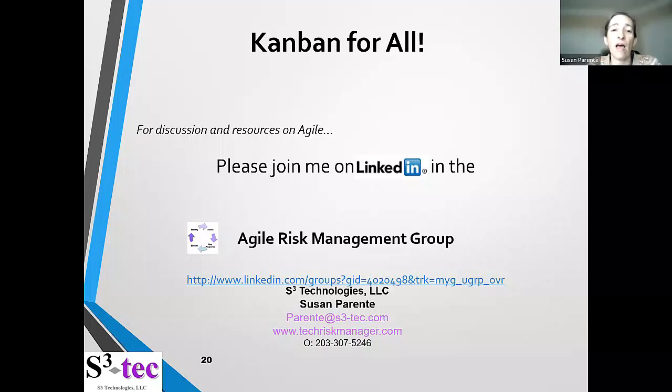So that's what I would say: have each of these departments have their own task board and prioritize things, and then put that task board someplace where it's transparent so other people can see it and know what tasks are being worked on by whom. So in the case of the sticky note, I would have my name on the task that I'm working on, or sometimes you'll see it as swim lanes where it's my name here, Susan, and then all the things that I'm working on and where those tasks are at, and then other people's names for their tasks. That's how it looks in Jira, if you use Jira. So yeah, go ahead and give it a shot.